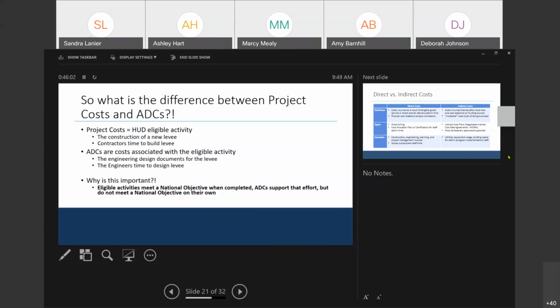Reporting is an administrative function. That is something we will discuss further, because it will only be applicable to those applications that are awarded funds. That is built on probably two or three hours on a quarterly basis. So that would need to be accounted for, obviously, because it's going to be a requirement of the project. It will have to be accounted for as somebody delivering that through in-kind services.